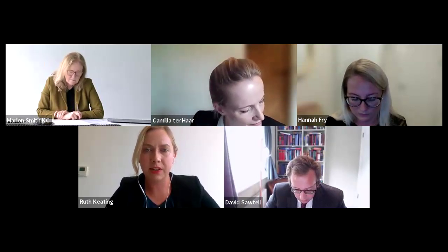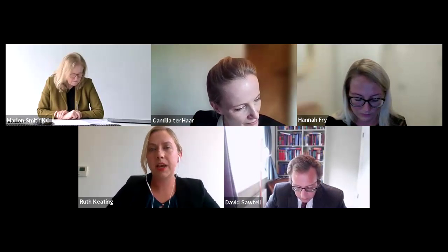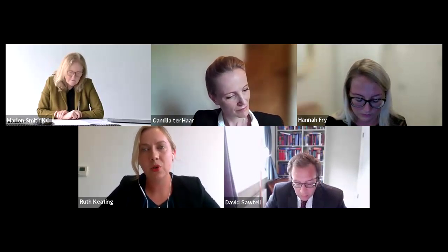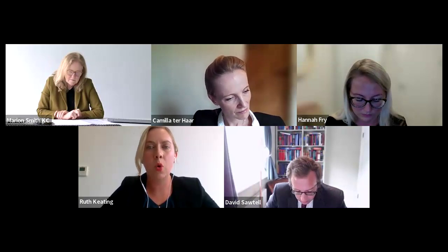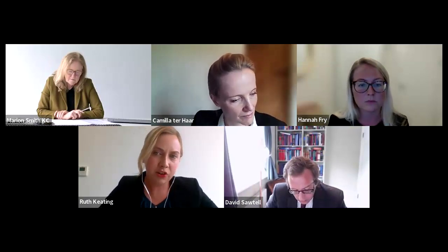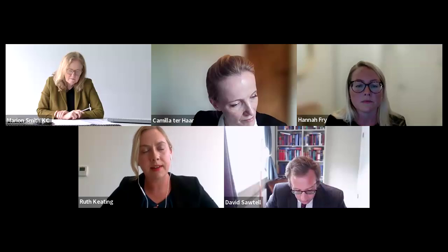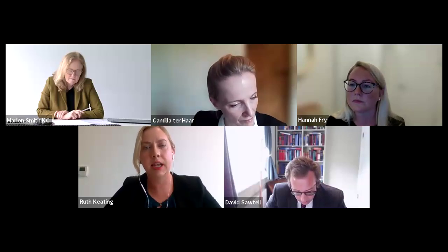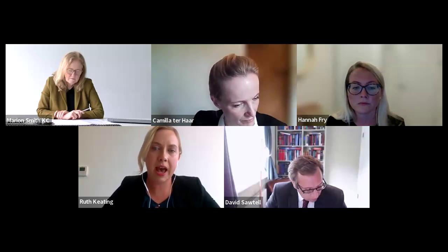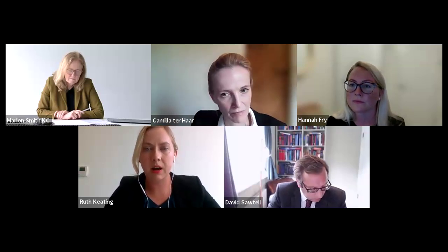I think it's worth noting the wording of clause 2.26.8 on relevant events. There's 3 subsections essentially there, but it talks about relevant events in terms of 1, the passing into law of any statute, statutory instruments, or subordinate legislation. Again, we're seeing this emphasis on these parallel legal developments that can happen alongside your contract, the exercise of any statutory power, and finally the publication of any guidance.